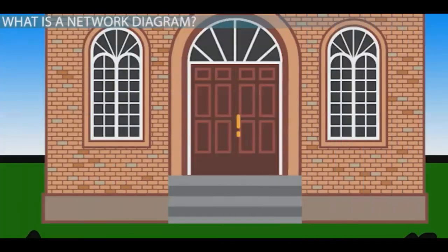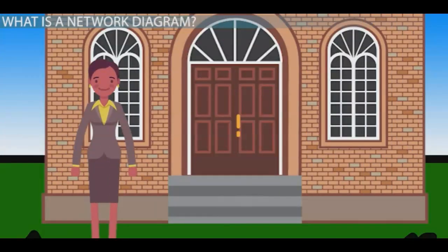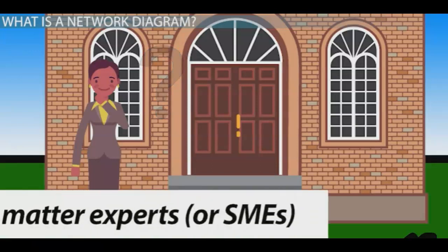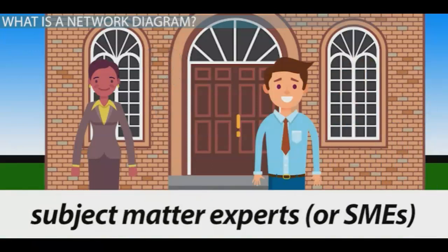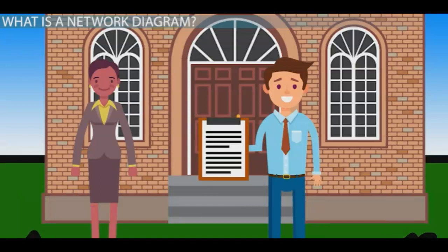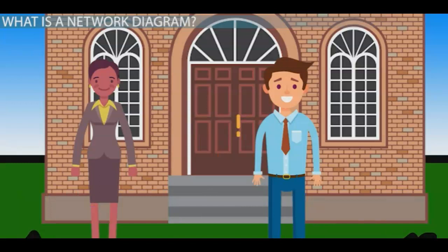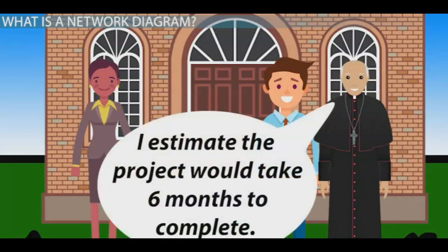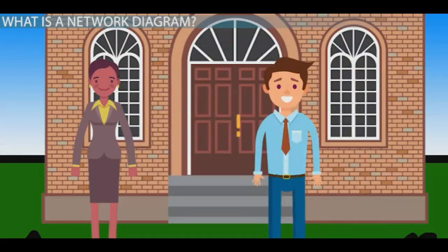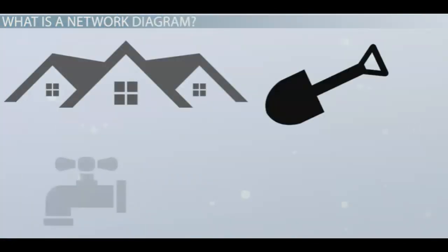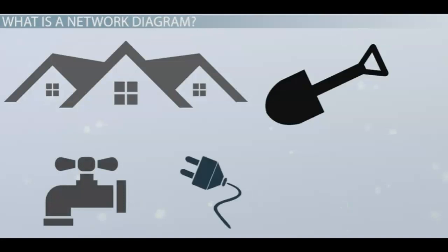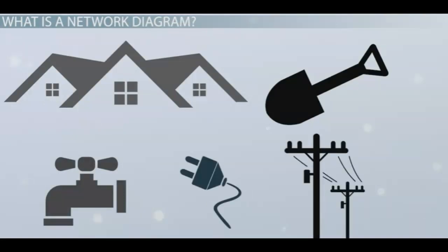For example, a project manager took on a volunteer assignment for a church building renovation project. Although unfamiliar with the construction industry, the project manager worked closely with her subject matter experts, or SMEs, and created a project schedule network diagram. Note, prior to joining the project, the church leaders estimated the project would take 6 months to complete. Her SMEs provided her with a list of remediation tasks, including replacing the roof, asbestos removal, creating plumbing drawings, electrical drawings, telephone pole subproject, etc.